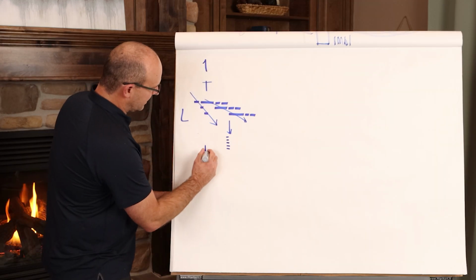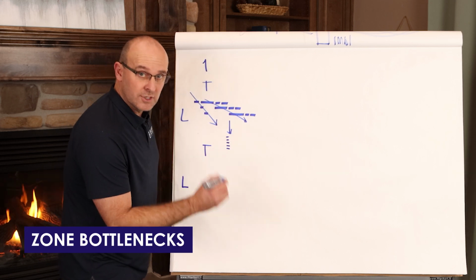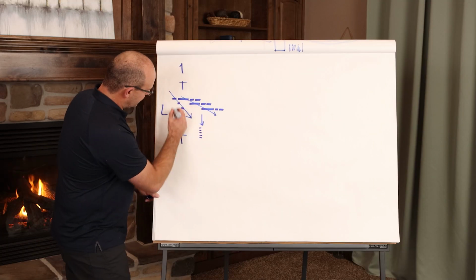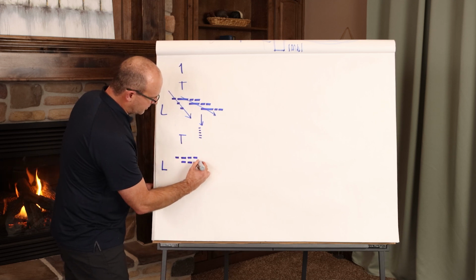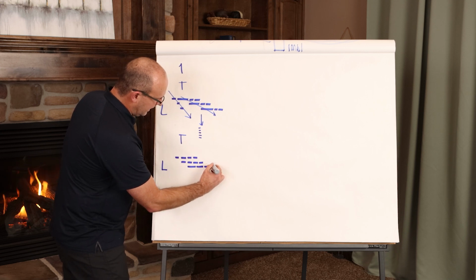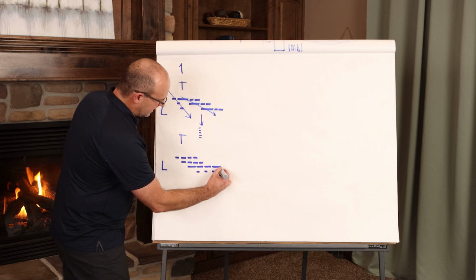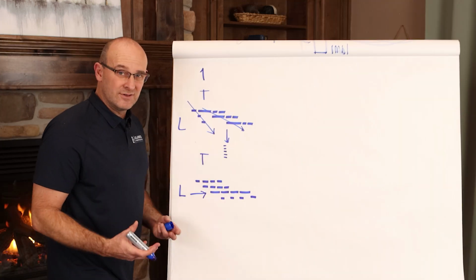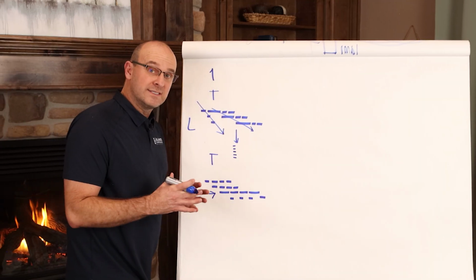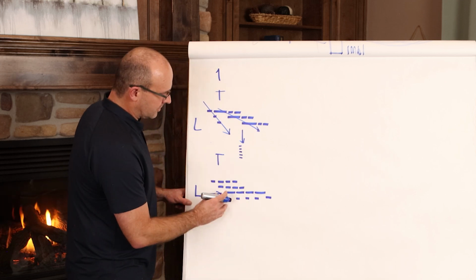The other thing is, if you're in a time by location format, you will also see what's called zone bottlenecks. So let's say that your durations had been fixed up here and everything has been ironed out, but zone number 3, for some reason, is just more complex, right? It's just giving you a hard time. Well, what's going to happen here, and you can see, is that everything's sub-optimized. Everything on this third zone takes longer. So you need to level that out, probably by minimizing the actual area of zone 3 and leveling that out so you don't have what's called a zone bottleneck.